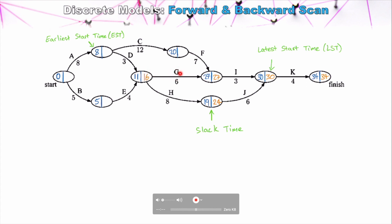That slack time of 10 for Task G is not simply the difference between the two node values, because there's a second task coming out of that node — you must manually calculate it. When two paths come to a node, we take the lowest value as input. For Task F, we can start it as late as 20 without delaying the project. Again, with two paths coming to the next node, we take the smallest: Task D can start as late as 13 with no delay. Task C, however, must be started no later than eight — it's a good example where Task D has slack time even though it may not appear obvious from the node values.